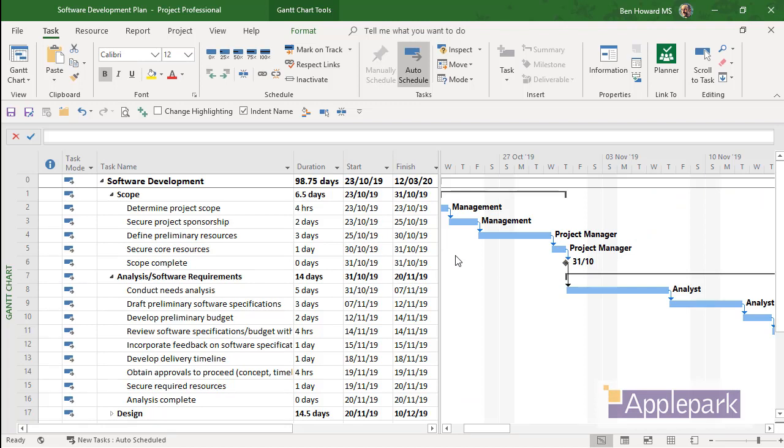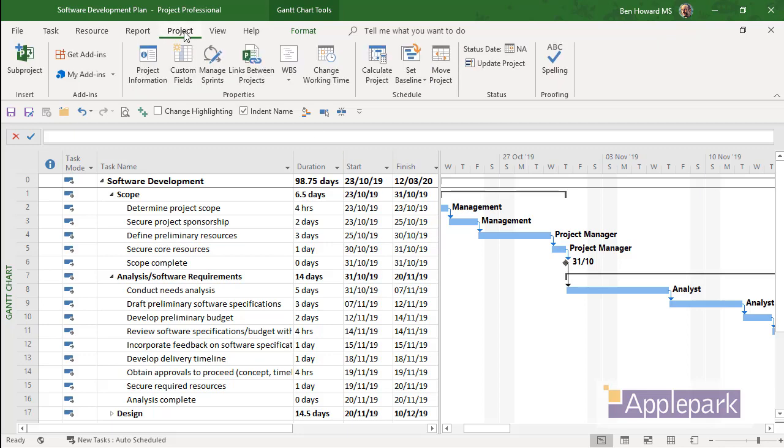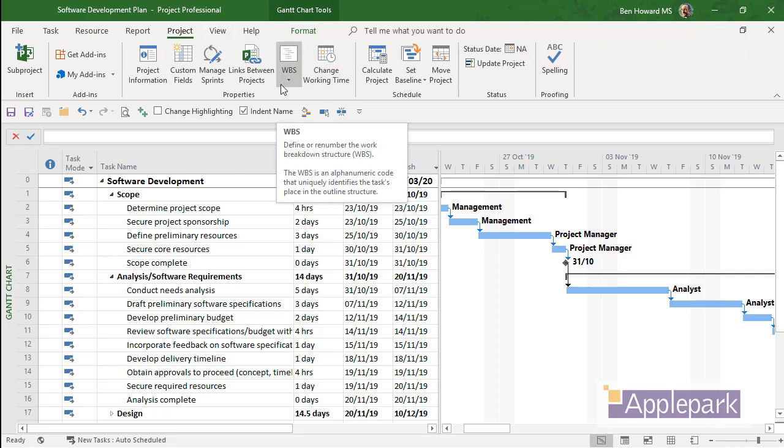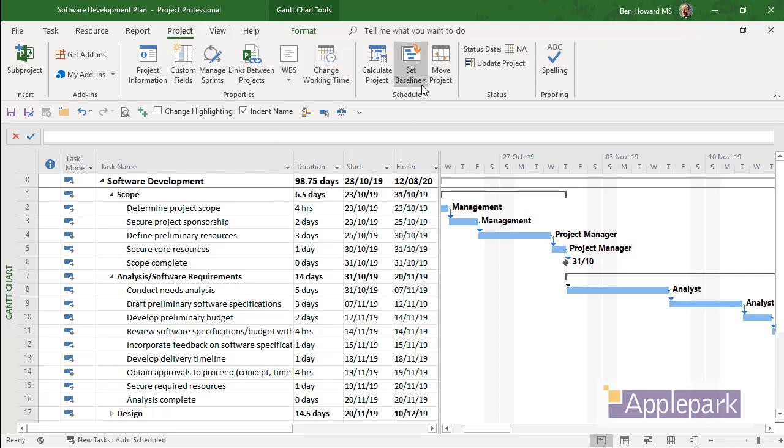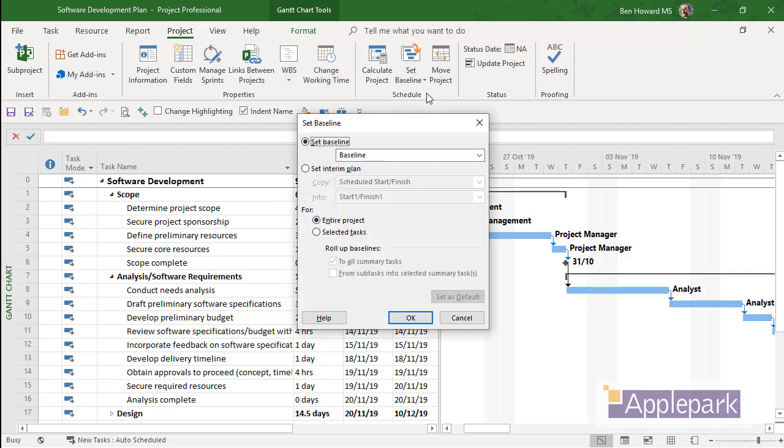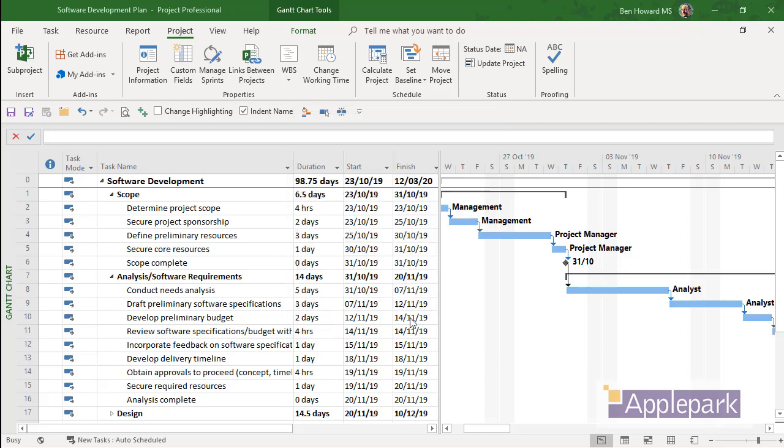Okay, let's have a look at taking multiple baselines and displaying multiple baselines for this particular plan, which is our software development plan. So to set a baseline, we click on the Project tab, we click on the Set Baseline button and we set a baseline. So this is going to be my first baseline. So I'm going to set the baseline for the entire project. So there's the baseline, there's the entire project. Click OK.